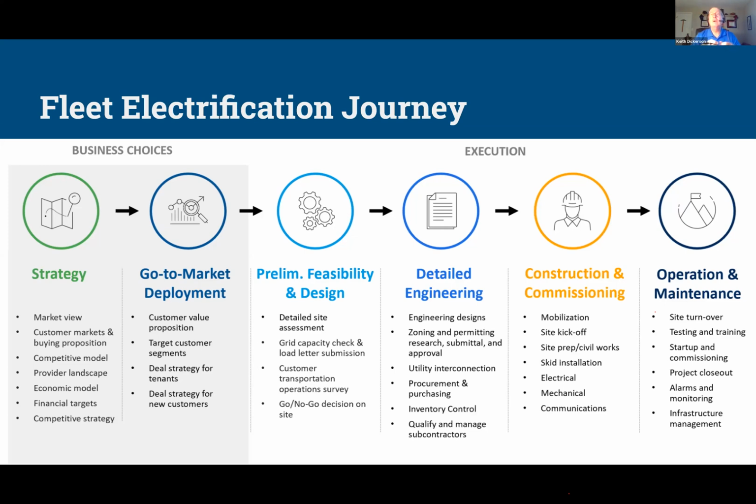And that's really the bread and butter of what Black and Veatch does. So generally speaking, let's say a school district already has a piece of property or properties. Now it could be a depot. It could be where you're going to put charging stations. It could be what we call on route charging. That's typically done with transit agencies or buses. But understanding your buildings, your property, your building stock, your facilities, and what you do, you go and do a detailed assessment. You say, hey, I want to put 20 buses here. I have this amount of property. I have this much availability of power. How do you get that? It's from the local utility in a process called utility coordination.